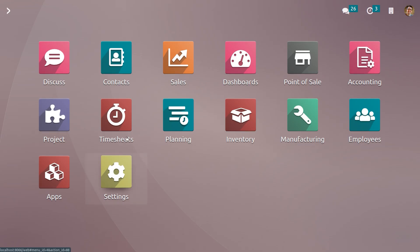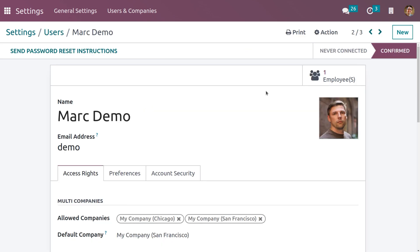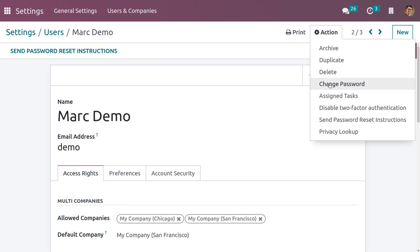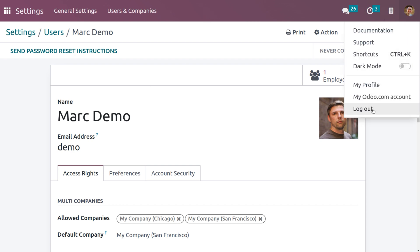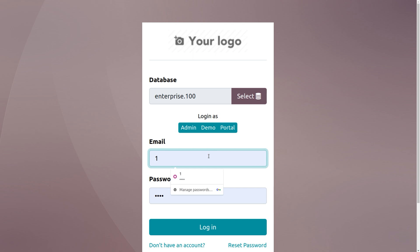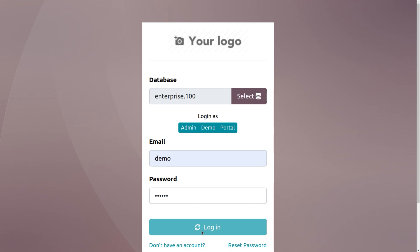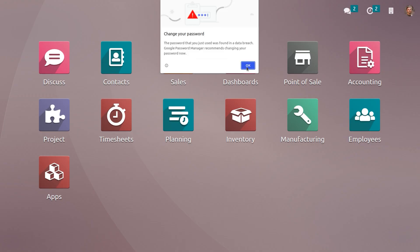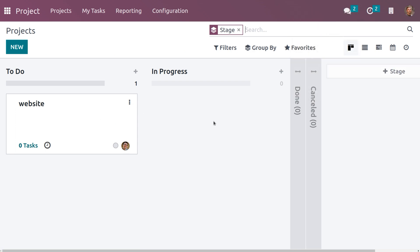Under Manage Users, let's choose Mark Demo as a user. Let me change the password of Mark Demo, then log out from Michelle Admin and log in as Mark Demo. We haven't set Mark Demo as a follower, but when you get into the module, you can see that Mark Demo can view the project even though he is not a follower, because we have set the visibility as All Internal Users.